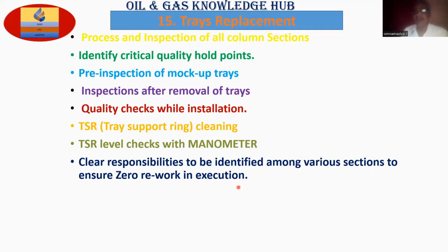So to prevent rework, checkpoints are most important. Write down the checkpoints, as per the SOPs you have to check, or you have to make your own checkpoints. Safety planning is most important. Which person will go inside? What are the requirements? Is proper gas testing completed or not? Proper safety gear is there with him, he is safe. Right tools are there. Should not use any bad tools or non-compliant, non-standard tools.